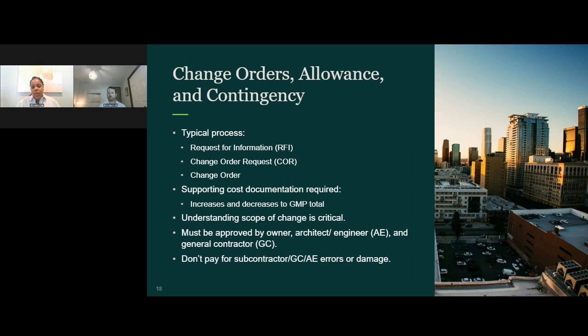One of the items that we always look at as part of reviewing prime contract change orders is ownership and accountability. So changes could be the result of changes in design. It could be an unforeseen condition, something we didn't know about until we got well into the construction, or it could just be an issue with constructability itself that came up at a later point. Those are very common, as are the user requested changes in a healthcare environment specifically.